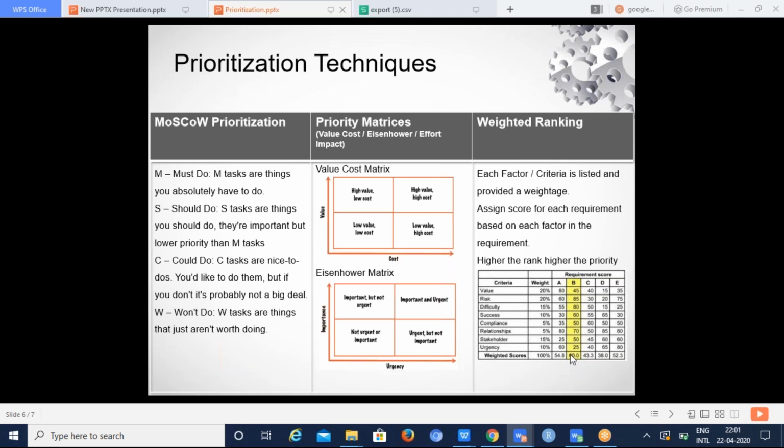So relationship is like, for example, as I explained, let's take a login screen. In case of requirement A, we define the functionality for username and password. And say for example, B, we define the functionality for the forgot password. So the requirement A has a higher dependency. So only if you implement the requirement B along with A, you get the highest value.